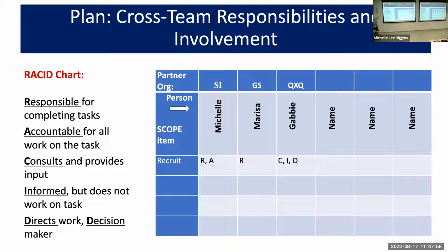What's really nice across the top where you put in the organization, it helps to give you a visual of who's missing. Did we actually include everybody in the planning of this project? Are there partners? Maybe we only see one person from that organization who's participating, and we have one other organization and they have a whole bunch of people, right? So it's a nice visual to balance things out. And this becomes a team activity to complete.